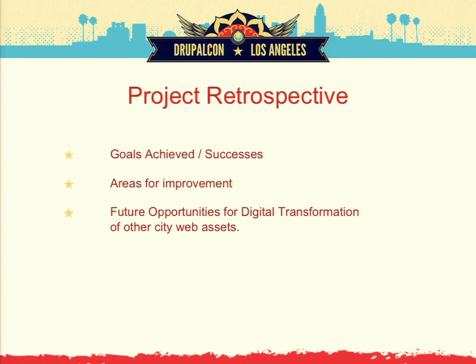We really didn't get our QA tests going as well as we did until later on during the process. So it's definitely an area of improvement that almost every project seems to encounter. We had a little bit of scheduling, making sure our data feeds and things that we had to work with were available early enough.